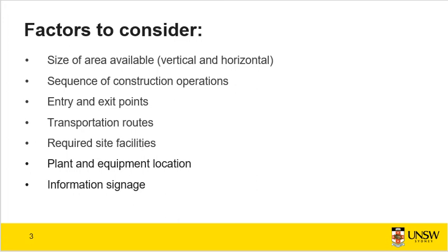Construction is restricted to within a boundary line specified in a design that is approved for construction. This is unless instructed otherwise by the client. Wooden hoarding, temporary fencing, concrete and water-filled barriers are usually placed near these boundary line perimeters to minimize the impacts of construction on the surrounding community and to separate the construction site from the public for security and safety reasons.